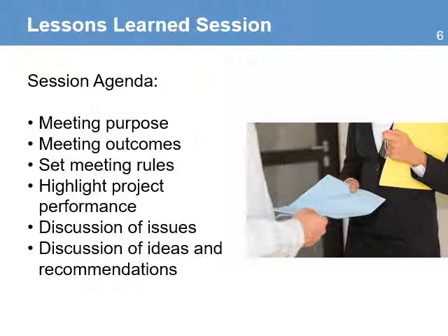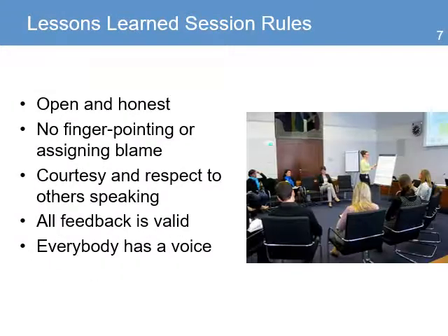In the agenda, include that there will be an opportunity to highlight the project performance. This helps ensure that the session will not focus on identifying only what went wrong, but also identify what went right. Include the approach for discussing the issues in the project and the time for the discussion of ideas and recommendations. The rules for the session need to be clear and made visible during the session so that everybody